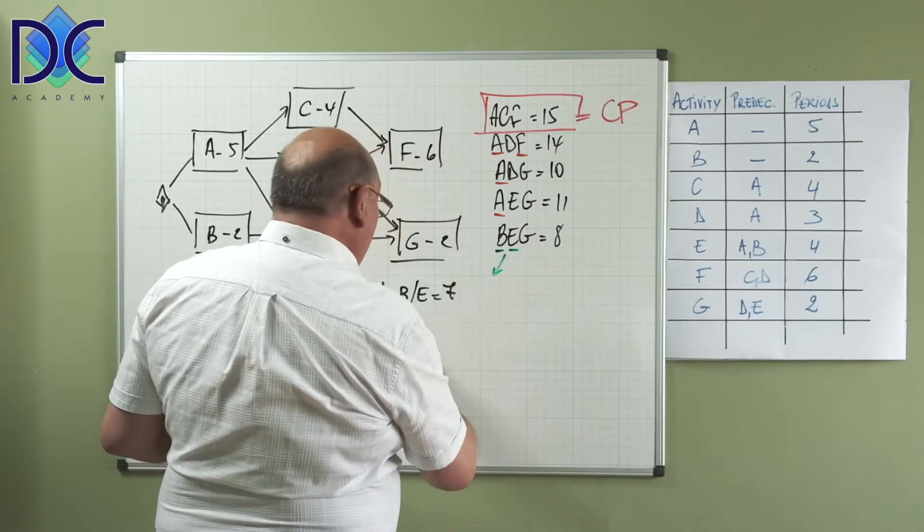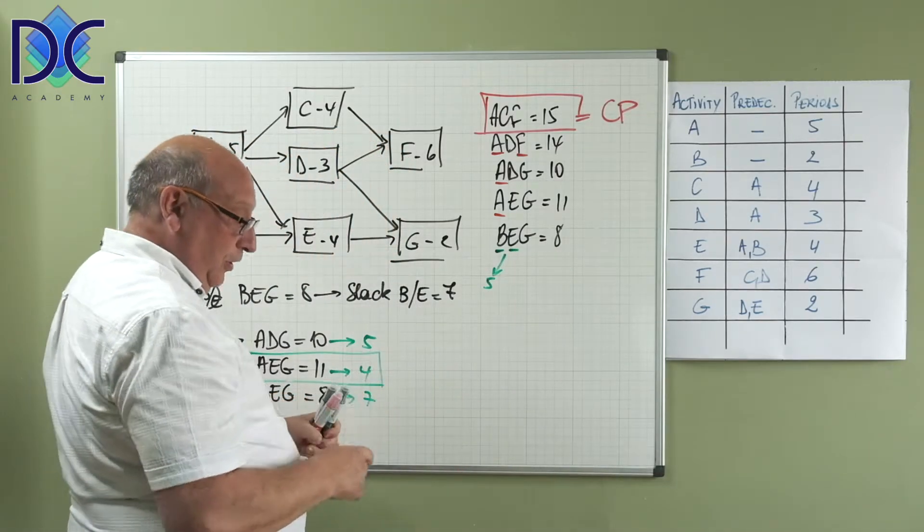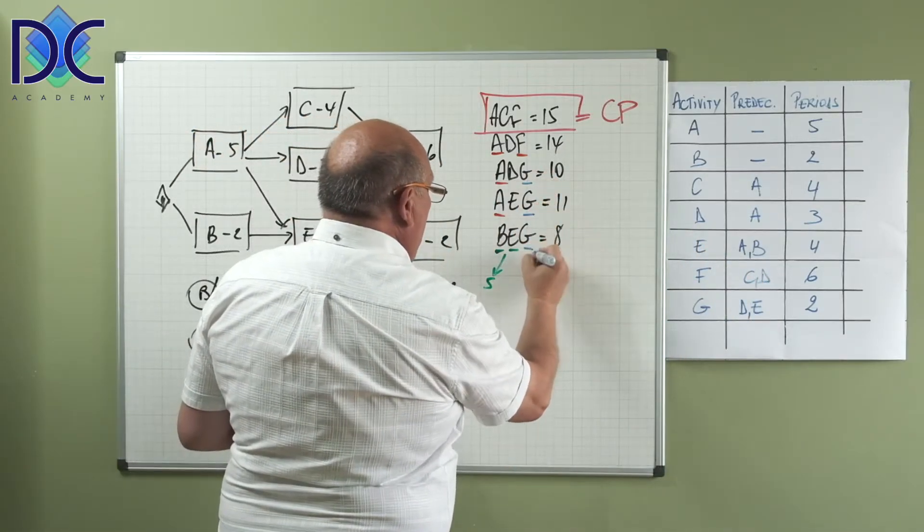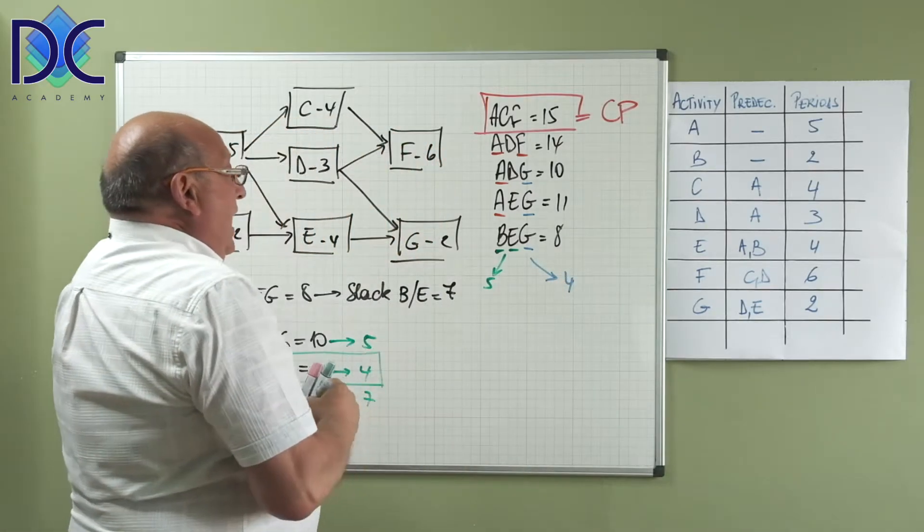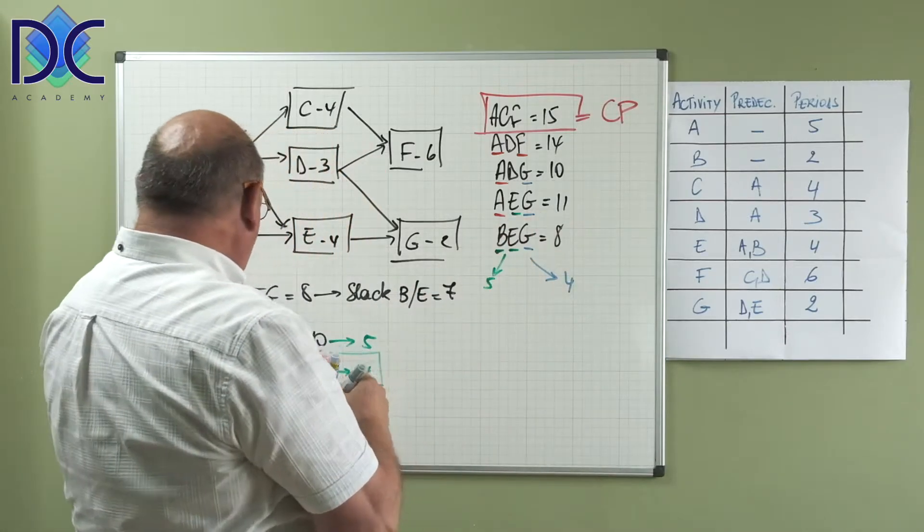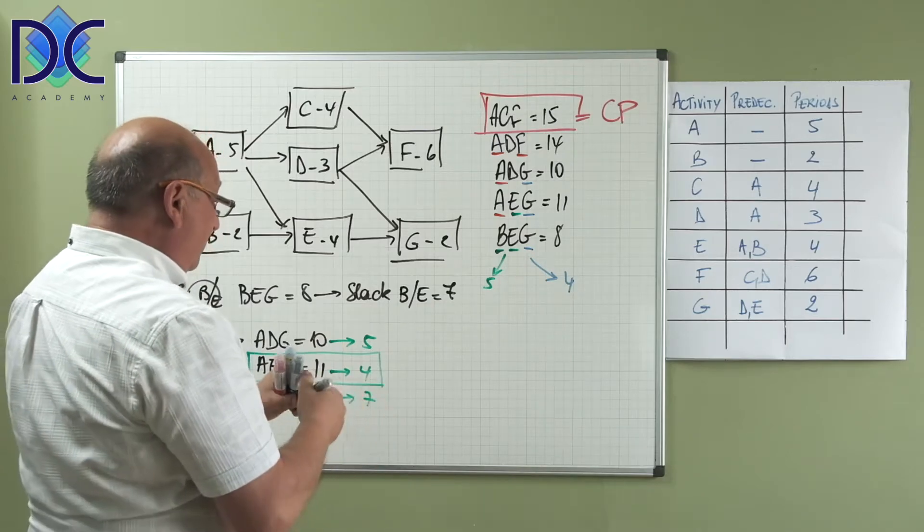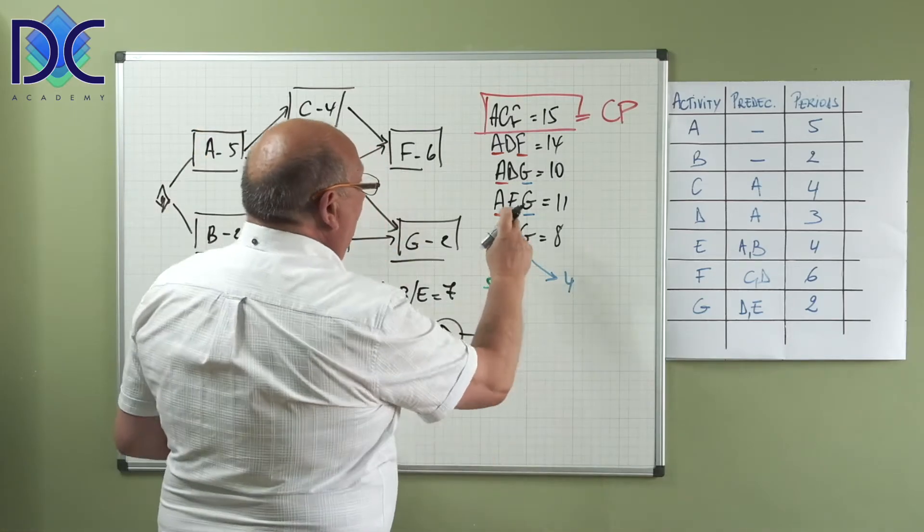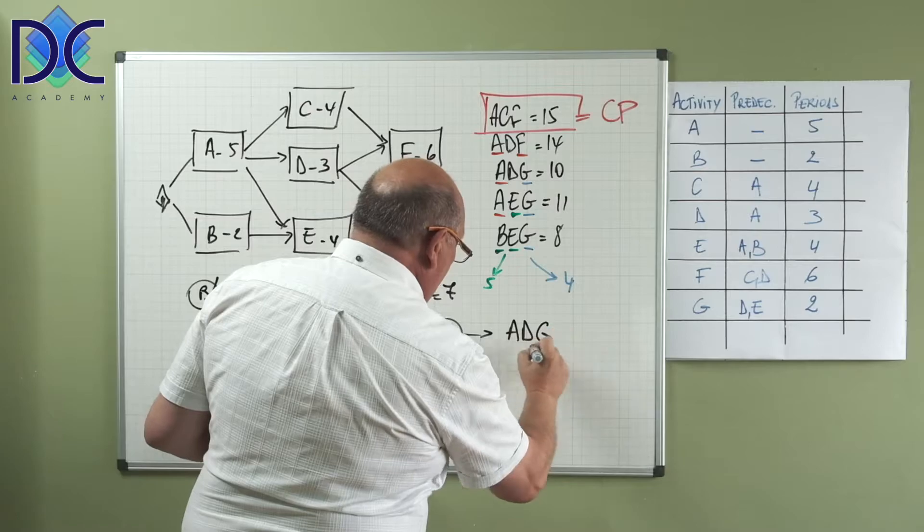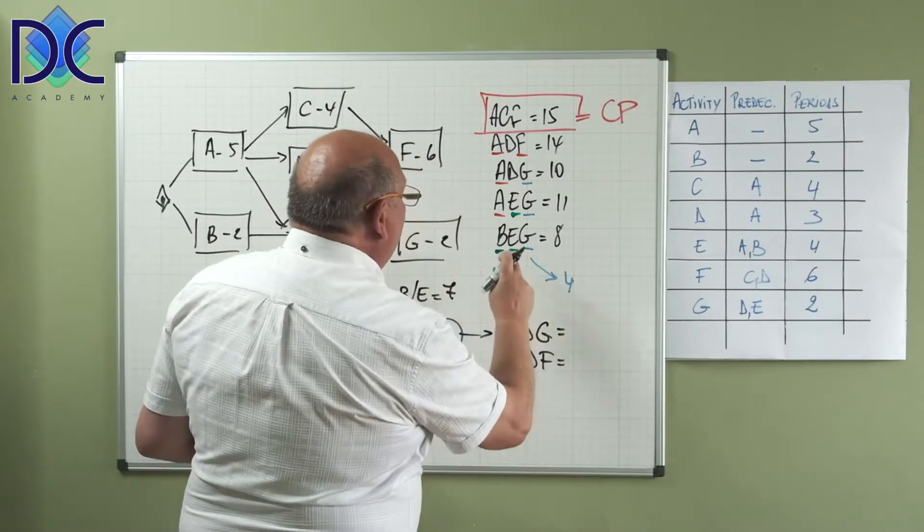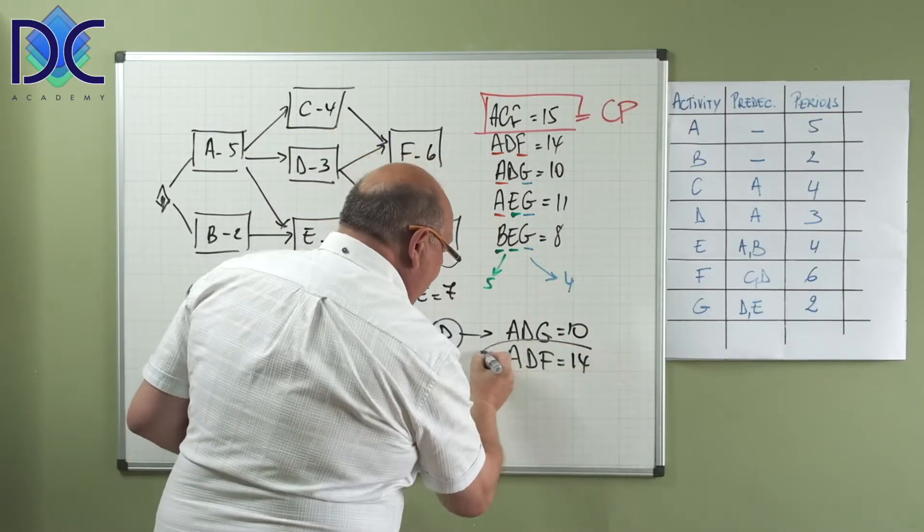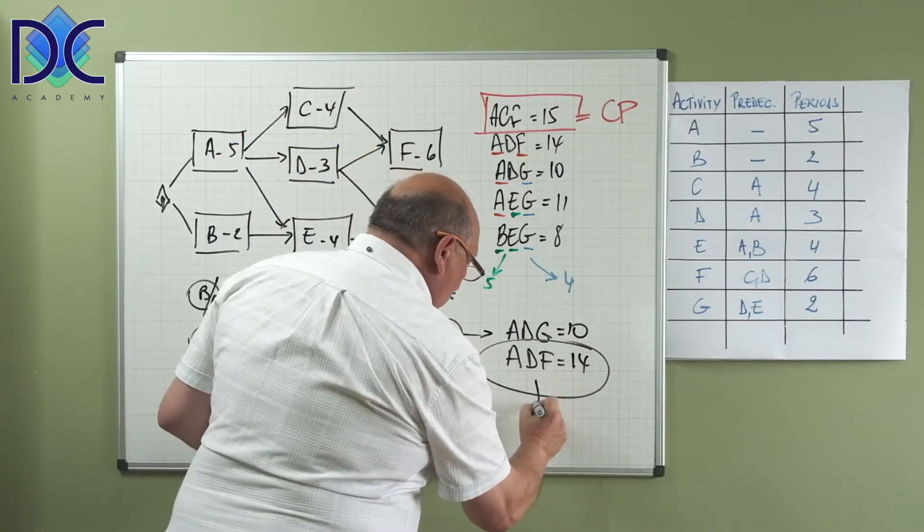So what did we find? We find B with the slack of 7. We find G with the slack of 4. And I still have D. D again is on two paths. When we have D, D is on the path ADG and ADF. On ADG we have 10, ADF we have 14, so basically we take 14.